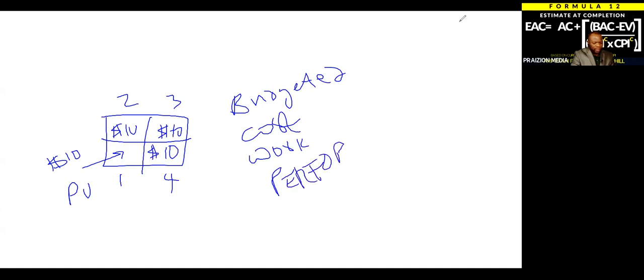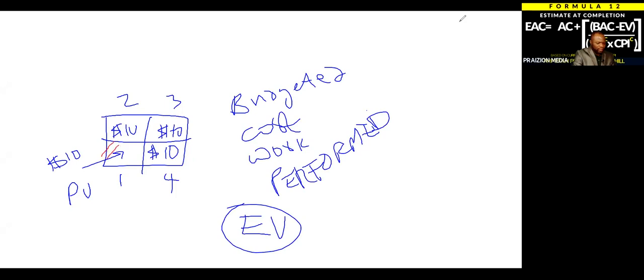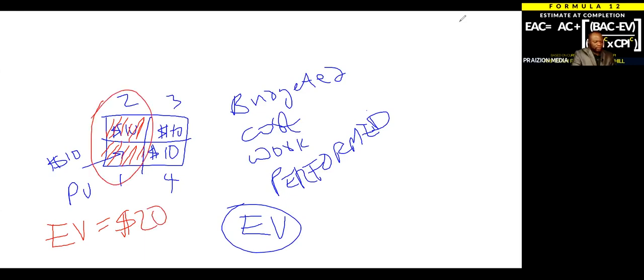If you ain't done it, you ain't got it. Earned value has to be performed. It's something you've done. So, if on the project you end up doing this and this, both on day one, then it means your earned value is $20. It's what you earned. You see, you got two of them done. So the formula for earned value is really this.